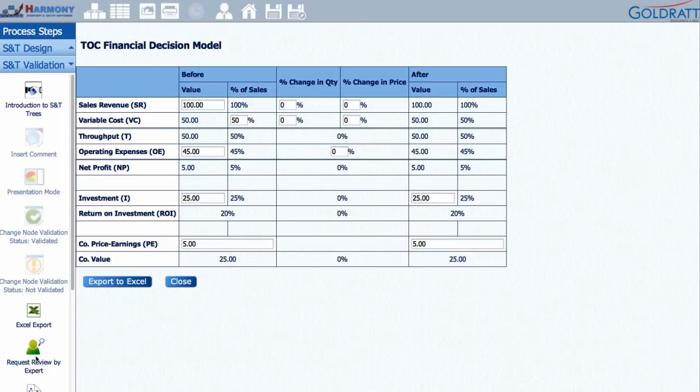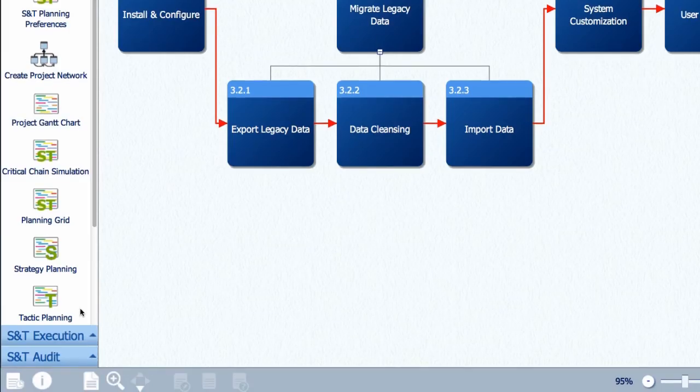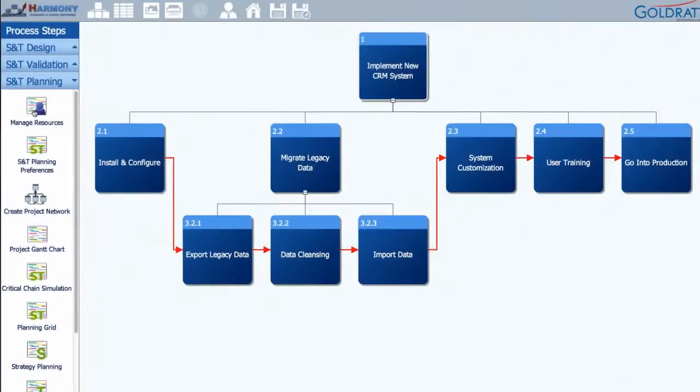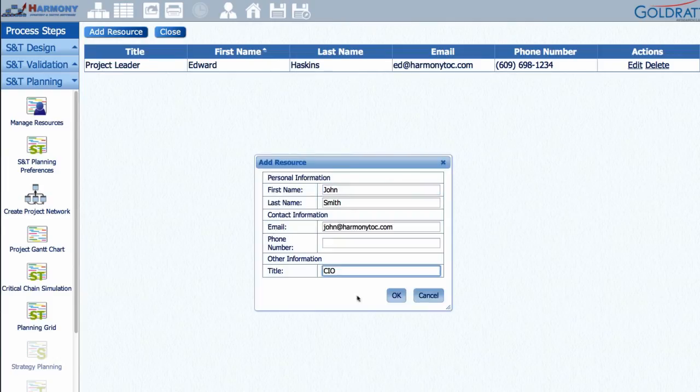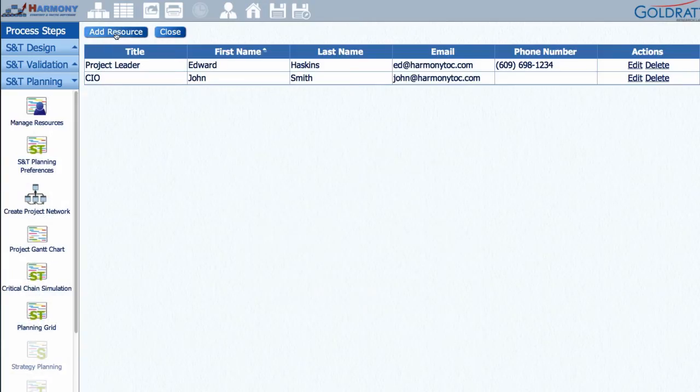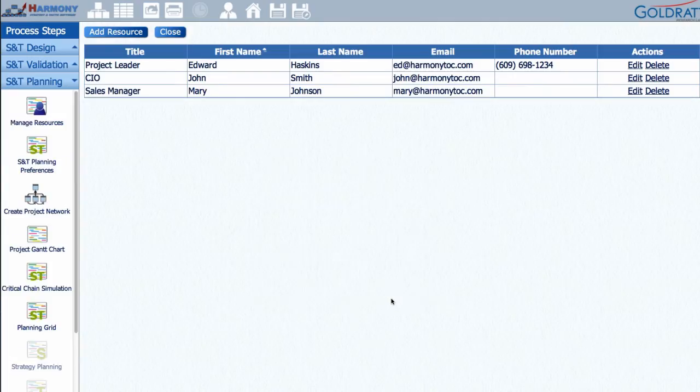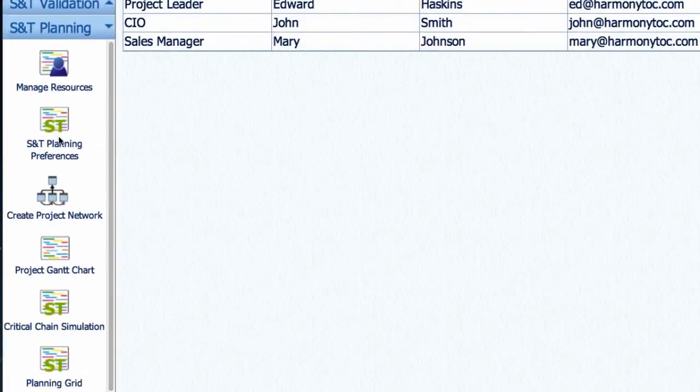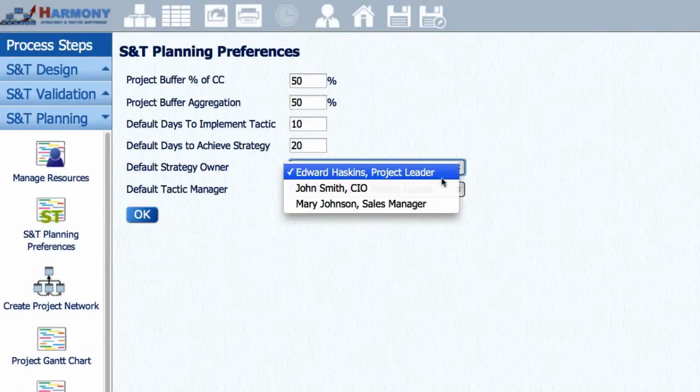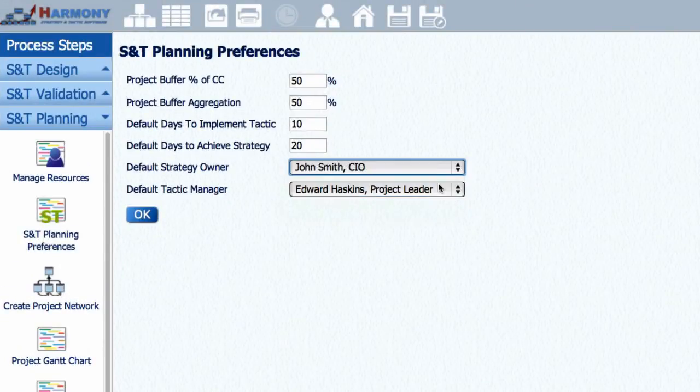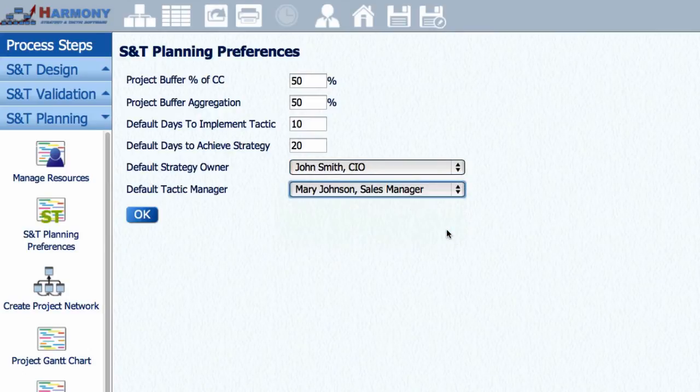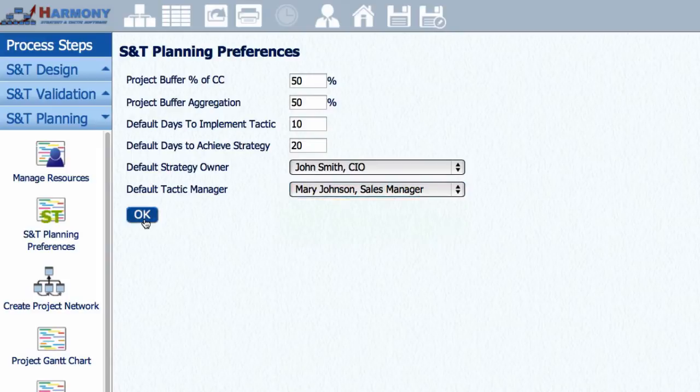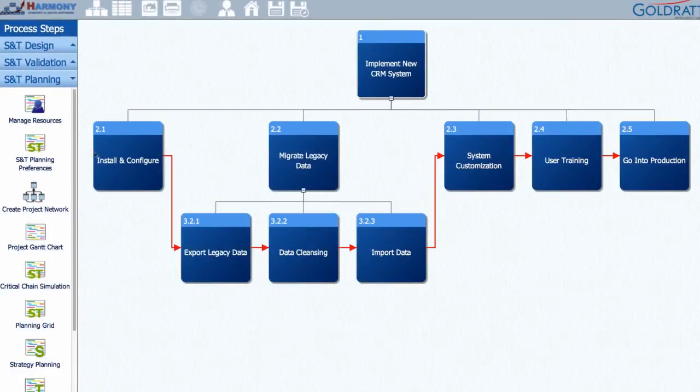Once you have shared your S&T tree and validated each change, the next step is to enter the planning stage. The S&T planning module is where you will define the resources needed to implement the proposed changes. You start by defining and then allocating resources such as strategy owners, those accountable for achievement of a strategy, tactic managers, those responsible for implementing a tactic, and task participants, those helping the tactic managers. Then, with these team members, you estimate the time to achieve each strategy and time to implement each tactic.